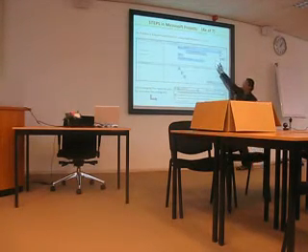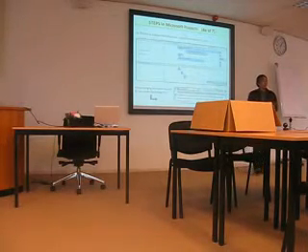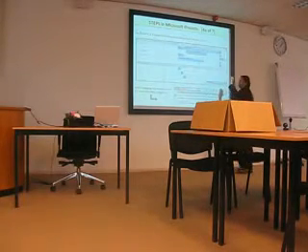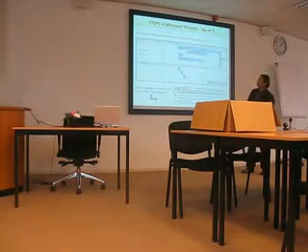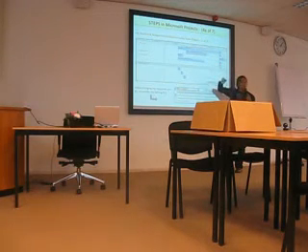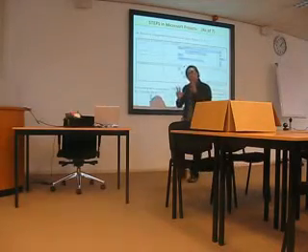So let's say it's 8 hours, and then I say 25%, which of 8 hours means 2 hours for this task. 2 hours. Although the person will do more than one task, he can do it. Because 2 hours one task, 2 hours another task, because the maximum hours is 8 hours.